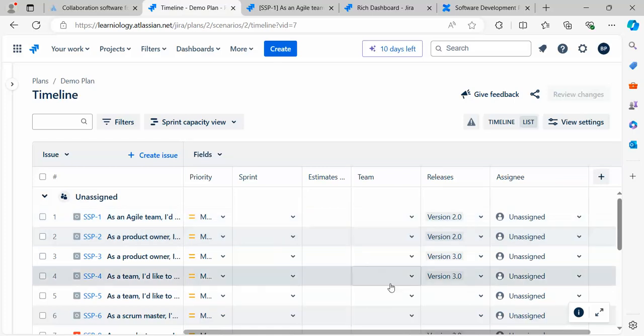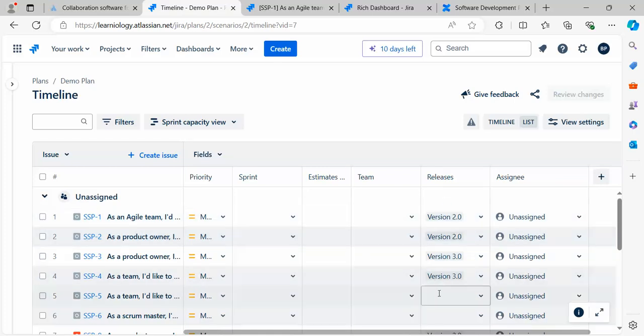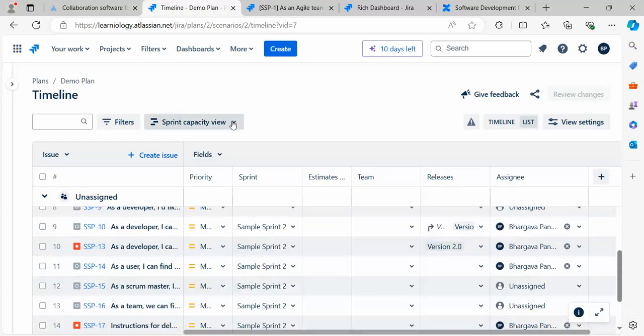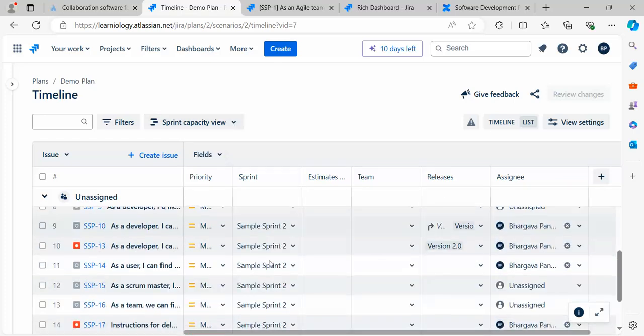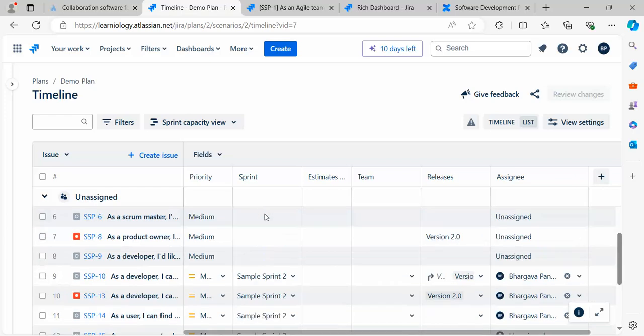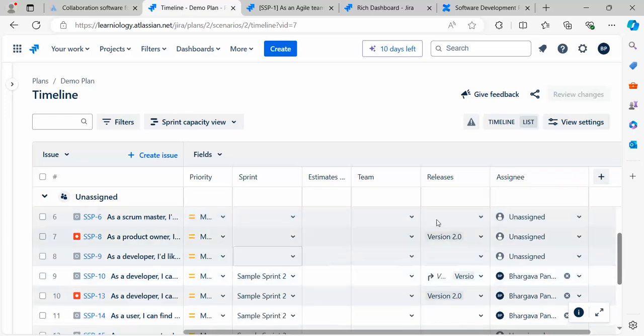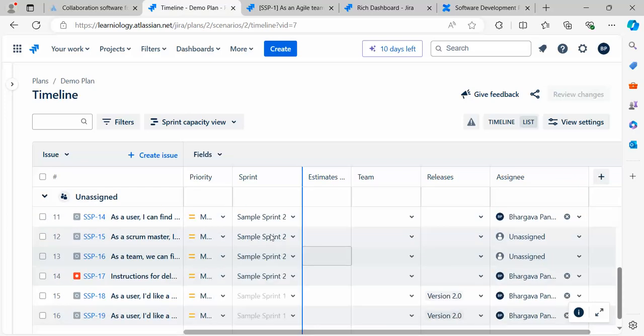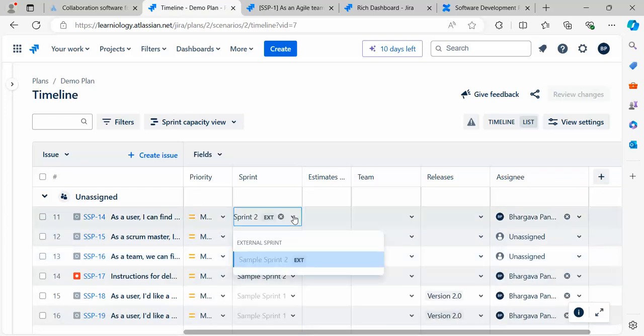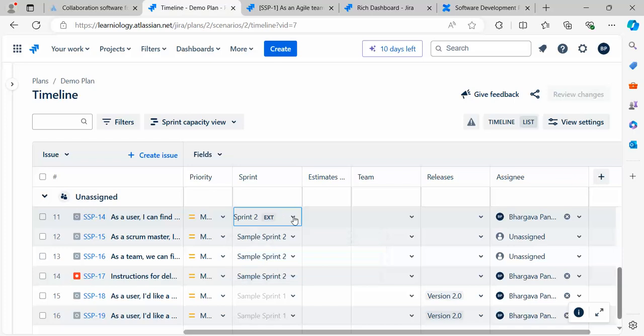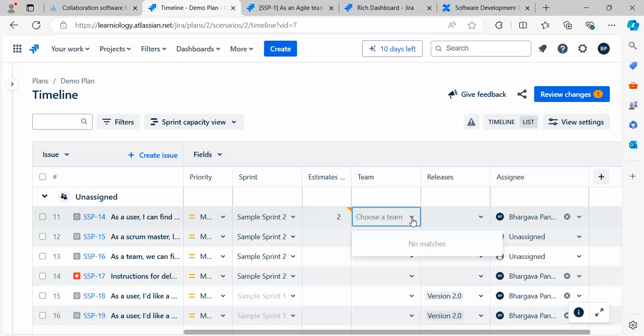If you see there are other options like Edit Basic Sprint Capacity View. If you click on it, it automatically changes to show when what is planned. This is planned in Sprint 2, this is in Release 3.